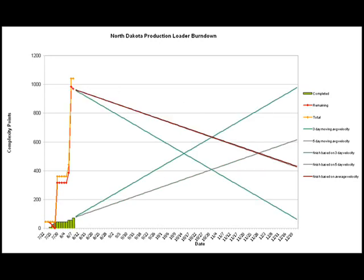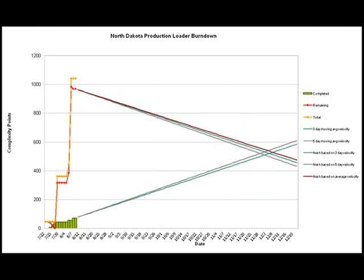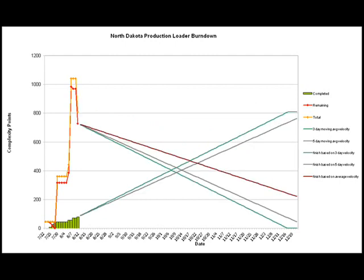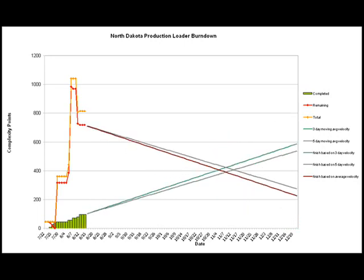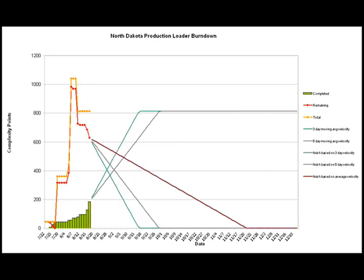So the team met with all the project stakeholders and prioritized all the features. We then cut some of the lowest priority features, including many of the technical stories, in order to bring the release date closer to what the business wanted. At this point, the team started focusing on development work, leading to a strong increase in velocity. This is the first time that we saw the average velocity finish line get to zero sometime near the end of November, which we now know was the actual finish date.